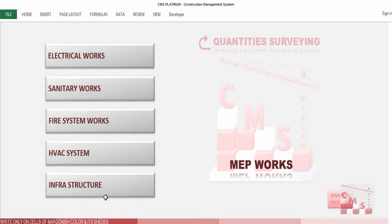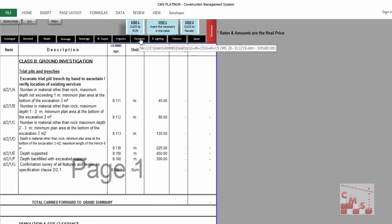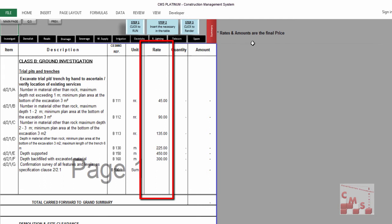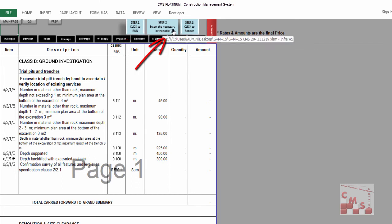Now for infrastructure work: when you click on infrastructure, CMS guides you to a full BOQ of infrastructure work starting with soil investigation, demolishing existing roads, road construction, drainage, sewage, water supply, irrigation, electricity, road lights, telecom, and spare items. At the end there is a summary. Note: all rates inserted here should be the final selling price — including overhead — since this BOQ is presented to the client. The process has three steps: Step 1 click to run, Step 2 insert the necessary data in the table, Step 3 click to render.